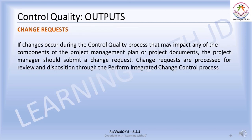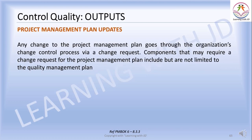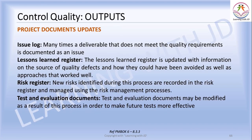Change requests are also an output. We did change requests at the time of executing quality, and we do it at the time of controlling quality as well. If a change occurs during the control quality process that impacts any component of the project management plan or project documents, the project manager should submit a change request, processed through PICC. Your project management plan and project documents also get updated. This is how you plan, manage, and control your quality.